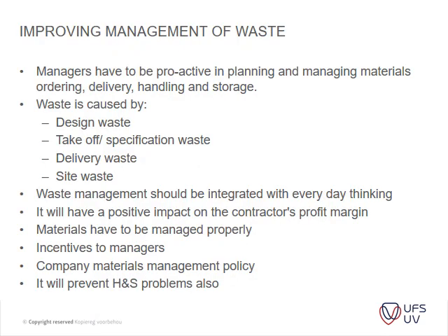Okay, then improving your management of waste. Managers have to be proactive in planning and managing materials ordering, delivery, handling, and storage. Waste is caused by design waste, takeoff specification waste, delivery waste, site waste. Waste management should be integrated with everyday thinking. It will have a positive impact on the contractor's profit margin. Materials have to be managed properly. Incentives to managers have to be put into place, and then company materials management policies, etc. It will prevent health and safety problems as well.